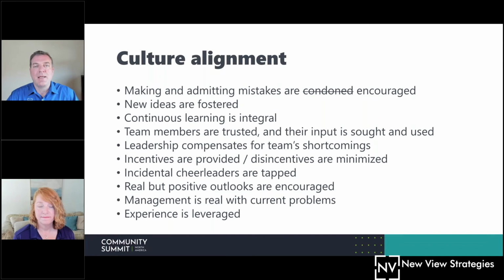That's so important. I think about an ERP implementation I did with a company in Orlando, and they started the project day one doing process mapping, right? Current state and then future state. I took two things away from that. One, it said we want to improve. In the future state mapping, they said, what can the system do for us and how are we going to adapt our processes to take advantage of that? But two, and probably more importantly, they said to the team, we value your input. We want you to determine how we're going to do business going forward. And boy, what a strong signal that sends to them.